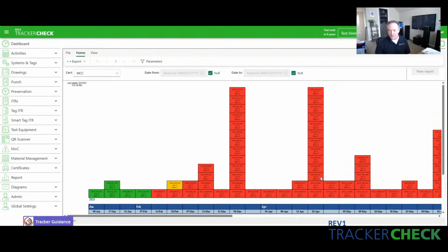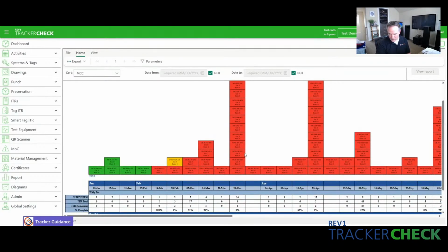So this right here, if I were a turnover coordinator on this project, I'd be asking if we could levelize this a little bit, maybe push these to the next week, and we'll have a better shot. But these could also be very small workbacks and easy to turn over. But it's a question to ask just based off of what I'm seeing here.